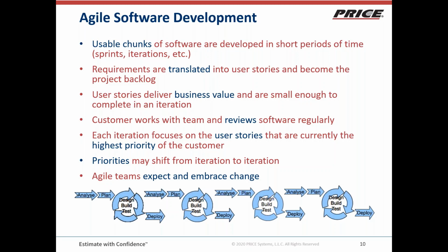And here's, this has just become a higher priority than everything else in the backlog, is to spend the next iteration adding a feature to this particular story. So the customer is able every iteration to shift the priorities by moving things up and down in the backlog, because the backlog is originally prioritized, but it gets reprioritized when the customers start to see working software.